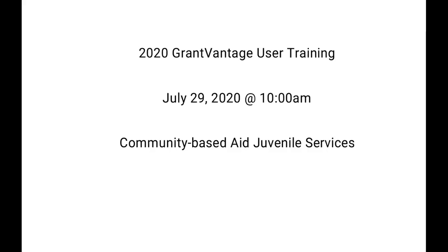For end-of-year reporting, is there additional steps to close the grant? Yes. So at the end of the grant, which we're in right now, we give you additional time just for those late invoices that sometimes roll through. So we give you 45 days after the close of the grant. So the grant ended on July 31st. The 2019 grant ended on July 31st. But we won't close the grant until August 14th. That's 45 days after the close of the grant.